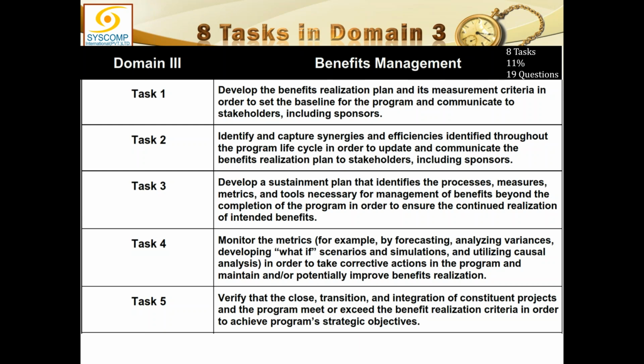Third task, develop a sustainment plan that identifies the processes, measures, metrics, and tools necessary for management of benefits beyond the completion of the program in order to ensure the continued realization of intended benefits. Now, just look at it. The projects which were under the program, the program manager has taken on the responsibility of realizing the benefits of the projects, but the program benefits will be realized up to some extent till they are handed over by transitioning it to the operations.